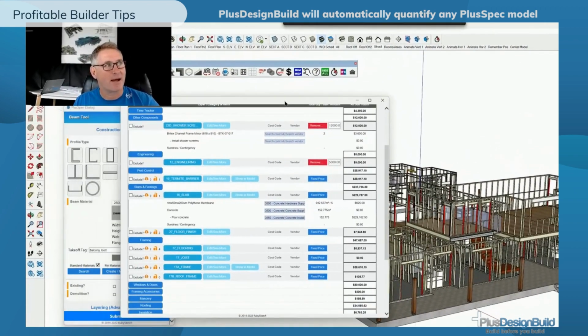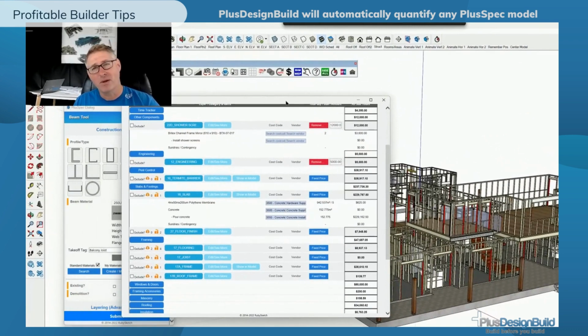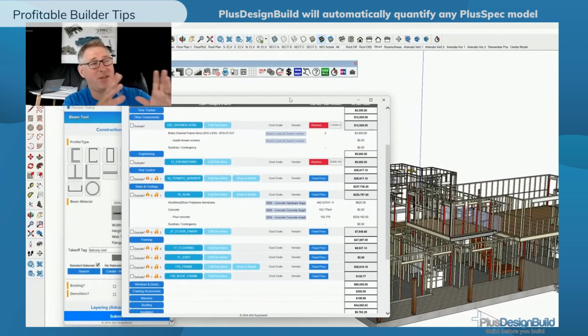I can look at a bill of quantities on that model, and it might be that Ian, when he sent me this plan, actually just wants me to give him an indication quote to make sure that this is feasible for the client's budget, which I would charge for in time, and he would forward that to the client. But what I'm doing is I'm getting an understanding of the job. I can quote a job like that and give him some really round high figures to make sure that they're within budget, and the client can say, yes, go ahead, or redesign.